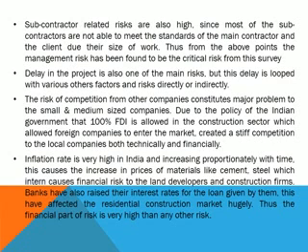Inflation rate is very high in India and increasing proportionately with time. This causes an increase in the price of materials like cement and steel, which in turn causes financial risk to the land developers and construction firms. Banks have also raised their interest rates for the loans given by them. This has affected the residential construction market hugely. Thus, the financial part of risk is higher than any other risk.